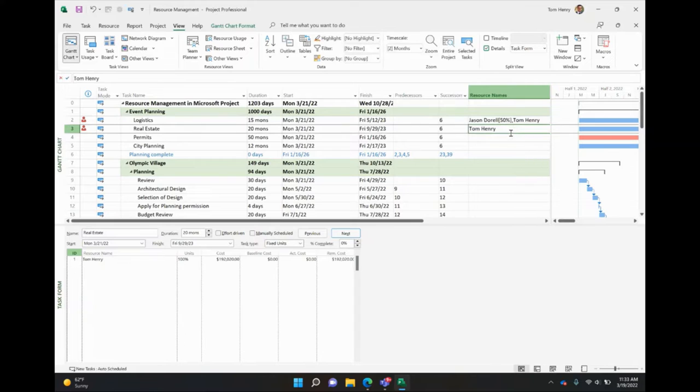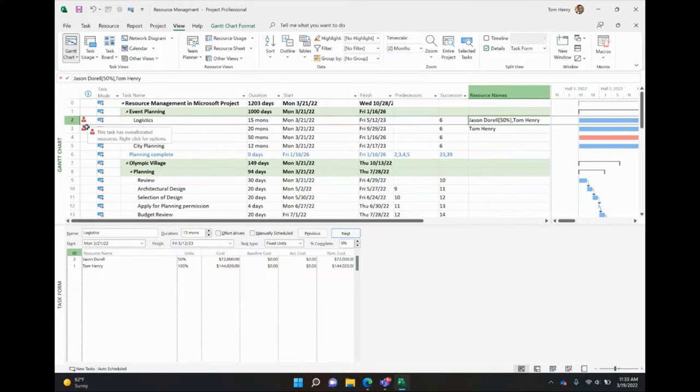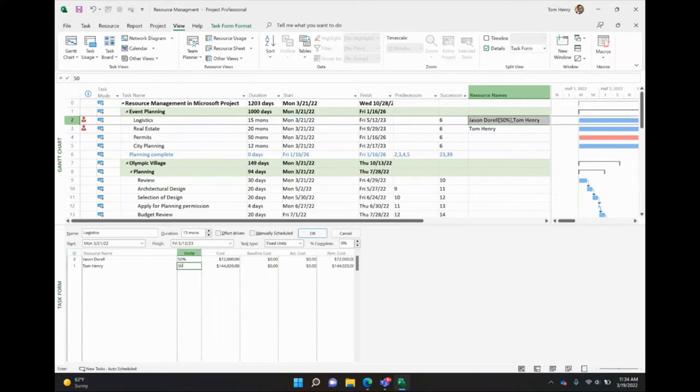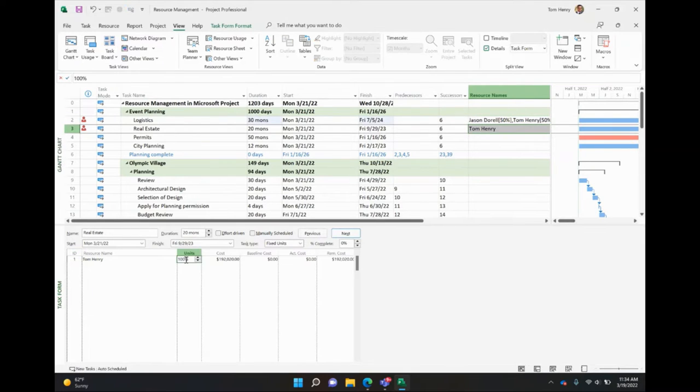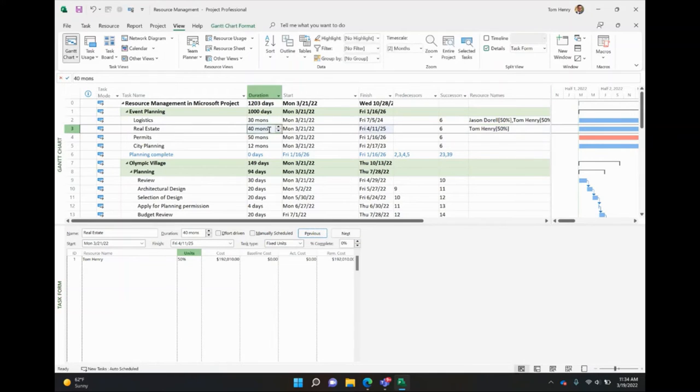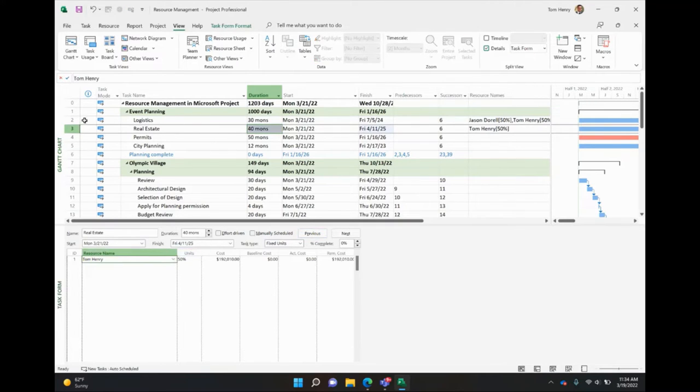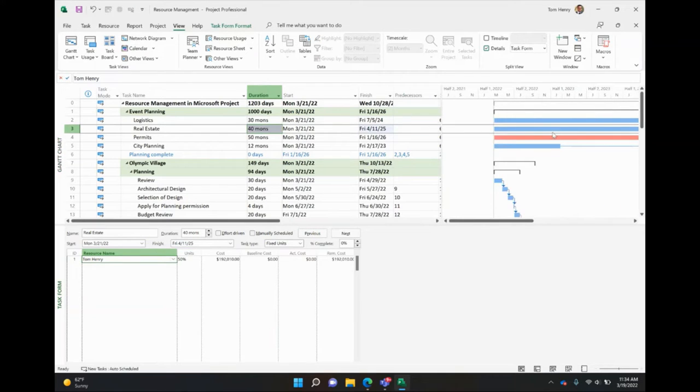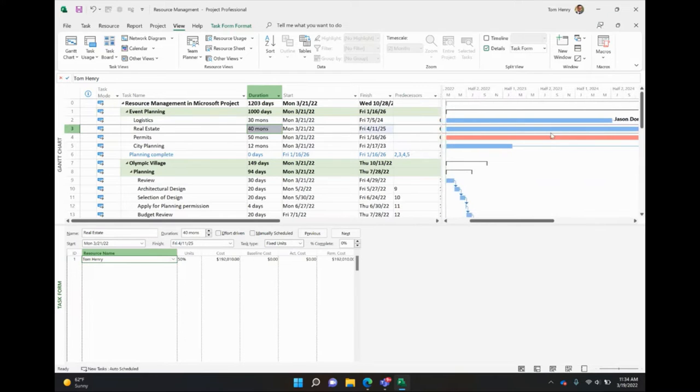This brings me to another way of assigning resources, the task form. This is probably my favorite way because it gives you the most choices and the most options. So you see we've got Jason and Tom on that one and Tom on that one. 50% on this one is working 100% and those tasks overlap. We can see that handily on the Gantt chart. And we have the infamous red man on the left hand side saying that these tasks are over allocated. So I'm going to come in here and make Tom 50% on this task. And on this task, 50% also. That should deal with the over allocation. However, it will significantly impact the duration. It's going to push out the duration of that task because I'm only working full to half time. There was a set number of hours of work within that time. That's pushed that out. So there we go, but we're no longer over allocated.